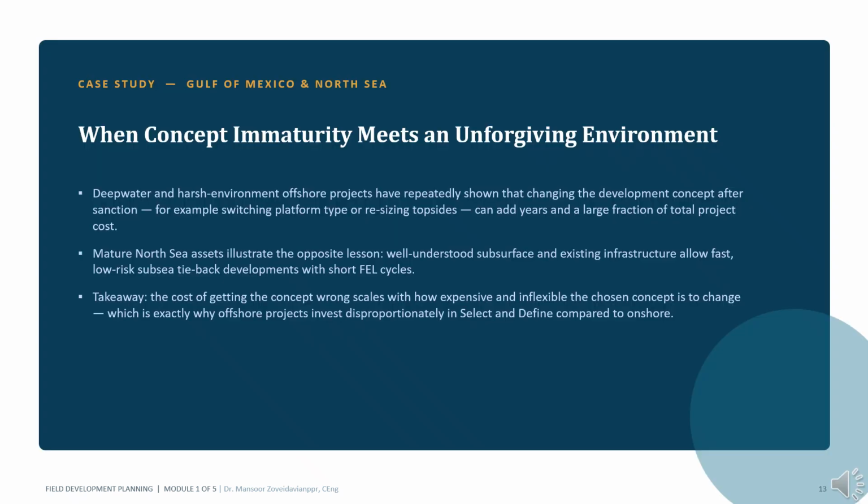This case study compares two important offshore development environments. Deepwater developments in regions such as the Gulf of Mexico demonstrate what happens when concept uncertainty remains high at the point of sanction. When major changes are required after approval, such as resizing facilities, modifying development strategies, or changing infrastructure configurations, the consequences can be severe. Additional costs and schedule delays can be significant because offshore systems are expensive and highly integrated.